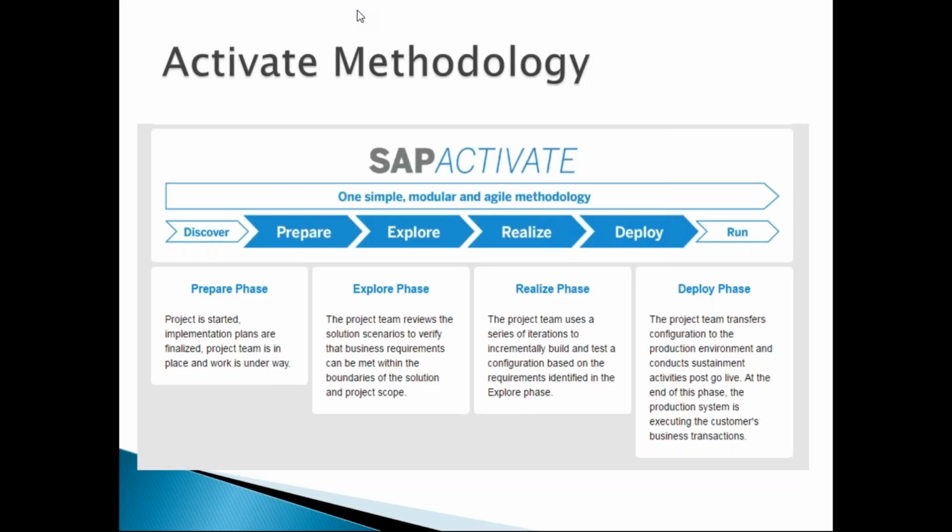And again, somewhere in the 16th week, you go in front of the customer, where by this time we have to make sure the product is 100% configured, and we will show the end-to-end product, end-to-end scenarios, complete testing of it, by the end of the 16th week, where we go in front of them for the 3rd time. And here whatever changes we take from the customer will be very minimal. Any cosmetic changes only will be accepted. Huge workflow changes, huge process specific changes will not be entertained at this stage, because we already showed you 2 times. Last time we are showing you the end-to-end scenario. Okay, so that is the way it goes.